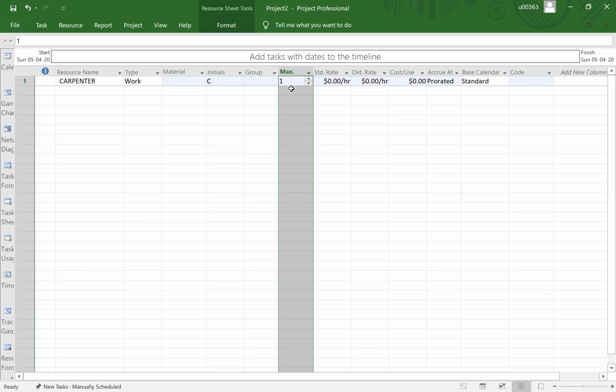Why is that percentage being mentioned there as an alternative? Okay, let's say I put 50%. 50% of carpenter. What does 50% of carpenter mean? Or in decimal point, it will appear 0.5. So 50% simply refers that the carpenter, or whatever it is, or even a machine, you basically use half of the working time.